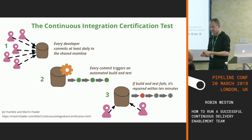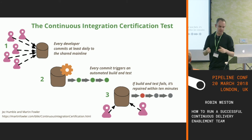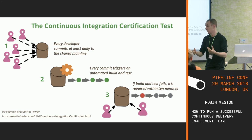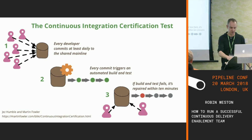It wasn't achievable. So we said, well, okay, how about some people in the same time zone have permissions to approve the pull requests? And they said, yep, okay, they were trusted people. And then suddenly, they were sitting next to you, so you could just go, I'll put a pull request in, but can you just come over to my desk and review it? You do it, and then, within 10, 20 minutes. So we cut the cycle time by 24 hours with zero technical changes, just by some process ones.